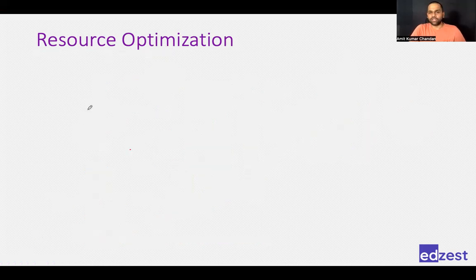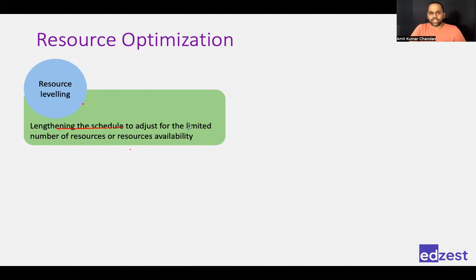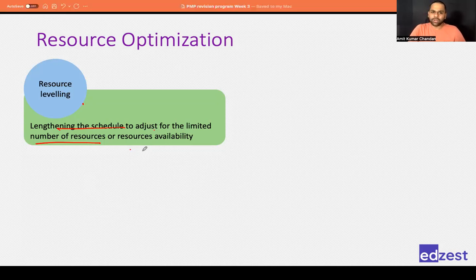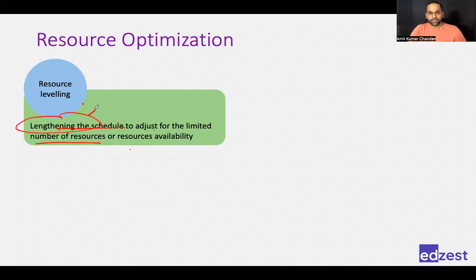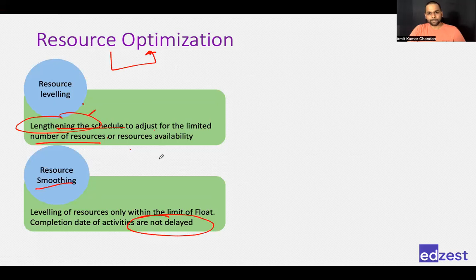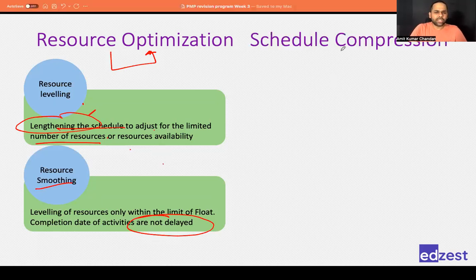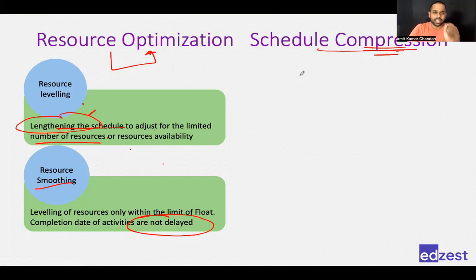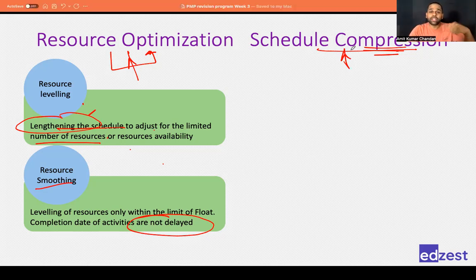Resource leveling means lengthening the schedule to adjust for limited available resources. Resource smoothing means adding extra resources so that activities complete without delaying the schedule. The objective of both is resource optimization — using the same or similar number of resources throughout the project. Next is schedule compression, where the objective is different: to complete the project faster.